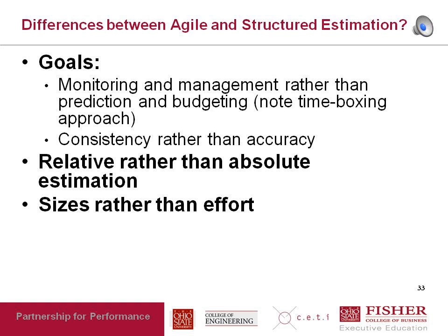You will also see, and once again, you will see this in the Fun with Legos or Agile Bootcamp game, that estimation is not done in absolute terms, but in relative terms. So you're estimating which use cases are larger and which use cases are smaller, or which requirements or stories are larger and smaller, rather than exactly how long implementing a particular use case or story might take. And this estimation is done in a relative manner as opposed to an absolute manner.